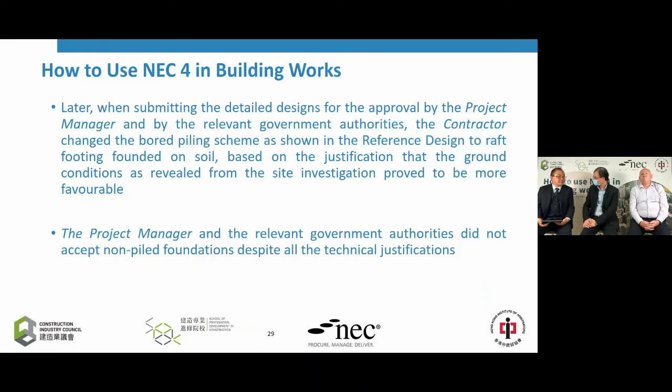And in that detailed design, the contractor departs or deviates from the schematic design submitted at the tender stage. They now propose to replace the original bored piling scheme as shown in the reference design, and also as shown in the schematic design submitted at the tender stage. And they want to replace this bored piling scheme by a rock footing foundation founded on soil.